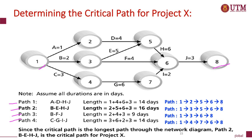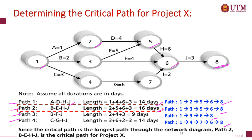For example, path 1 goes through nodes 1, 2, 5, 6, and 8. The sequence of activities for path 1 is A, D, H, J, and the total duration is 14 days. Continue to list the sequence of activities and time duration for path 2, path 3, and path 4. Path 2 has 16 days, which is the longest duration compared with the other 3 paths. Therefore, path 2 is the critical path since it is the longest path in the network diagram.